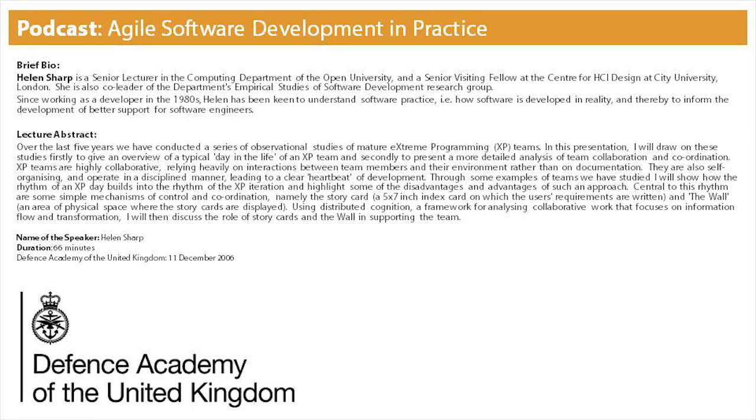That's correct. Yeah. That is how it works. However, remember you've got a development team who understands the application under development. They've got people they can talk to if they need to. I mean, the example of Team A, where you have, in a sense, discrete adverts, discrete customers, they can pick up virtually anything and work on it. However, the database migration example, they couldn't do it like that. They had to do it in a particular order. In that case, the manager controlled it. I said the manager fed story cards to them. So he made sure that the ones they worked on, that iteration, were a set, if you like. So there is that level of understanding that either comes from the developers themselves because they know the application, or is done by management.